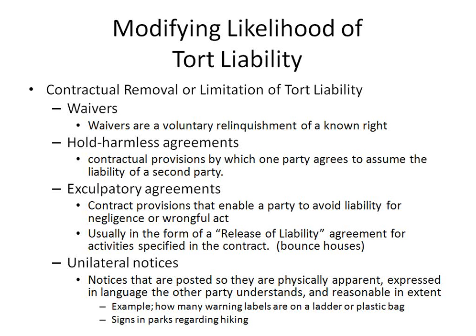A hold harmless agreement is a contractual provision in which one party agrees to assume the liability of the second. Usually, if people do work for us, we ask that there's a hold harmless. So essentially, if something happens and someone sues us, they're going to pay all the costs. That's their responsibility. So the risk is transferred through a hold harmless aspect.